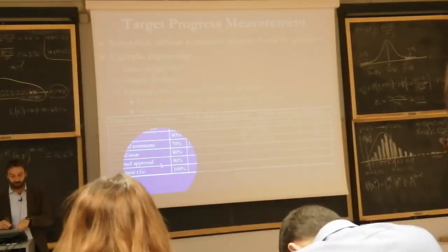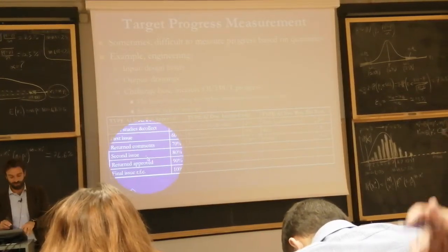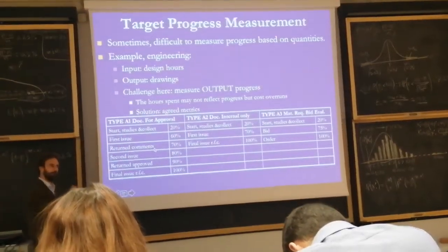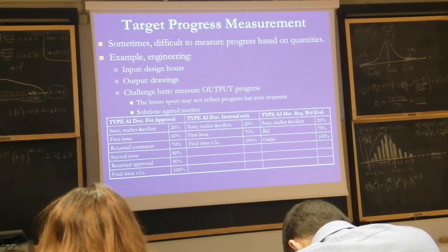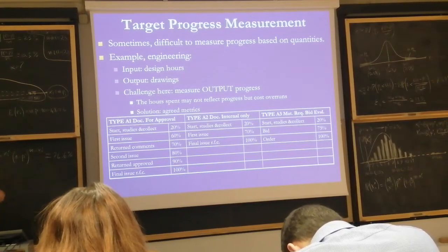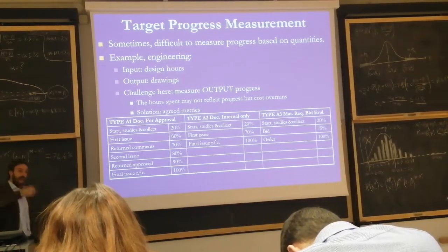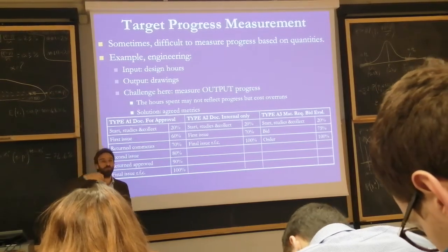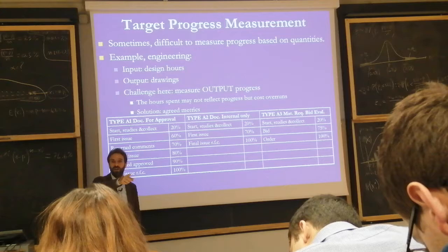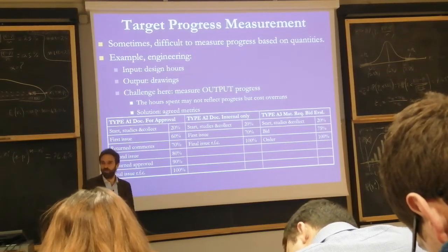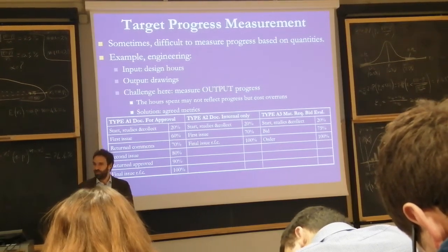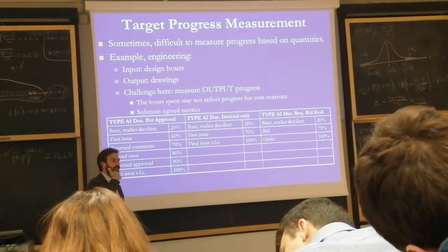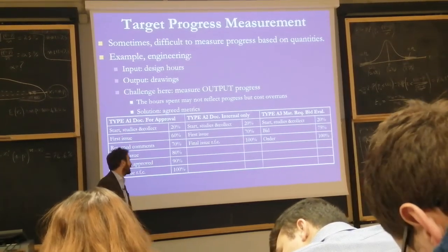If the document is returned approved, then it goes to 90%. But if the document returns disapproved with comments, we go back. From 70%, or from 80%, we go back to 70%. And the loop goes on. We spend more and more actual cost, and the work performed goes back. We incur greater and greater cost. There's a net cost escalation, right?